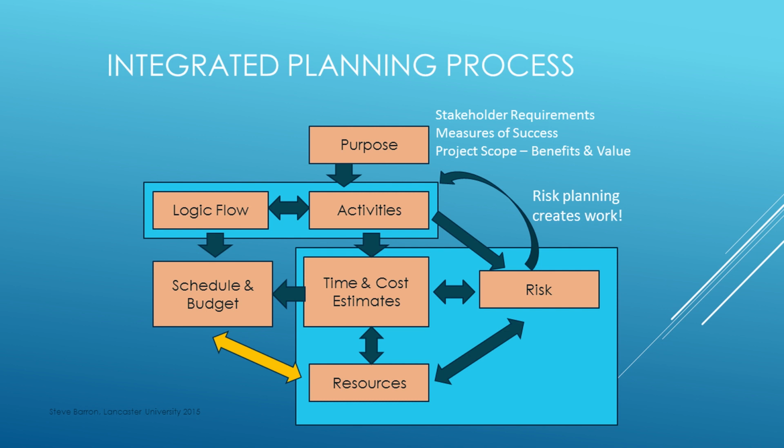The only remaining tasks needed to complete the activity plan are to check that the project time and cost are within project constraints, check resource availability against the schedule, and check that the cash flow represented by the budget schedule aligns with the cash availability within the company. The overall activity plan should be rechecked to ensure all the project requirements have been addressed and the activity plan is achievable and acceptable. This process presents an integrated approach to planning a project that is portable across industries and project types to produce a robust and comprehensive activity plan.